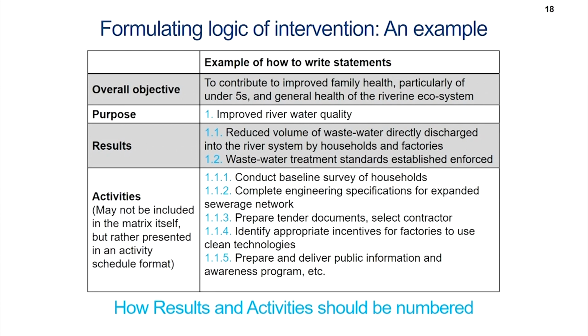Now, what are the activities that can be identified? They may not be included in the matrix itself, but rather presented in an activity schedule format. Activities need not be presented in the log frame matrix. However, we can have a separate activity schedule format, but the activities may also be listed up in such a manner.